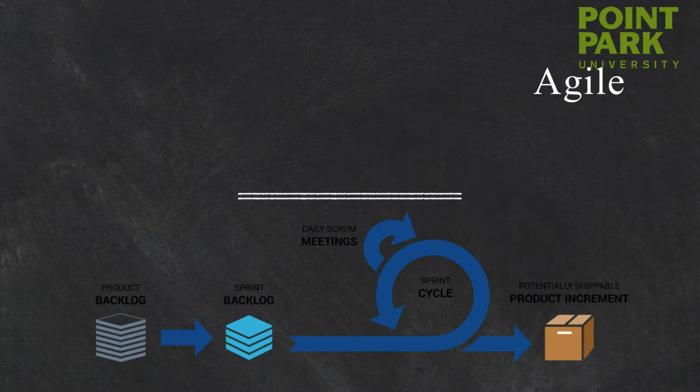So you might have 100 different tasks, and that's fine because what you want to do is put everything in this backlog. It's not going to happen overnight. It'll take a period of time. Then you have a sprint backlog, and a sprint is conventionally 2 weeks long. Some companies like to do 4 or 6, and to me that just throws a wrench in the game. Typically, I say stay with two weeks. You have 2 weeks to work on something, and you're not going to have everything.